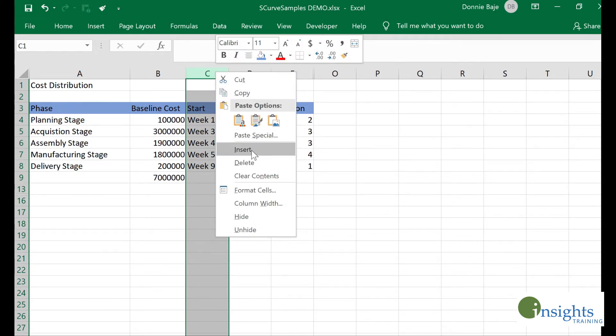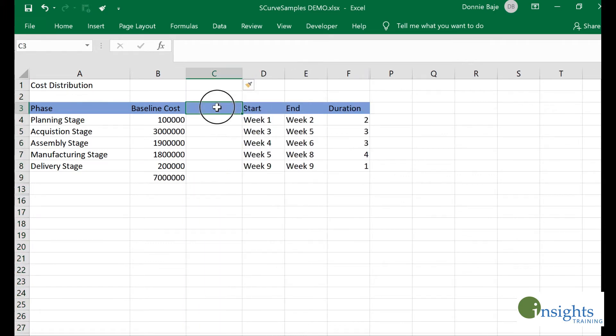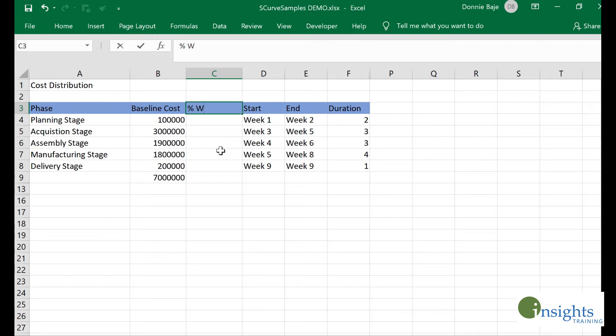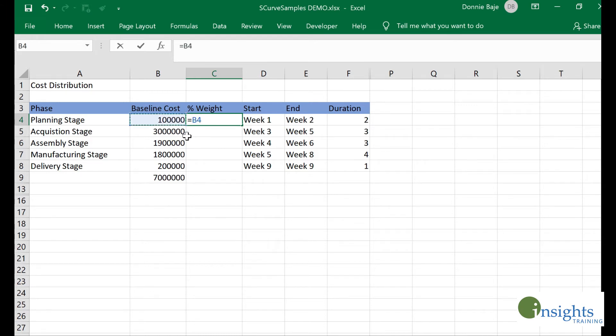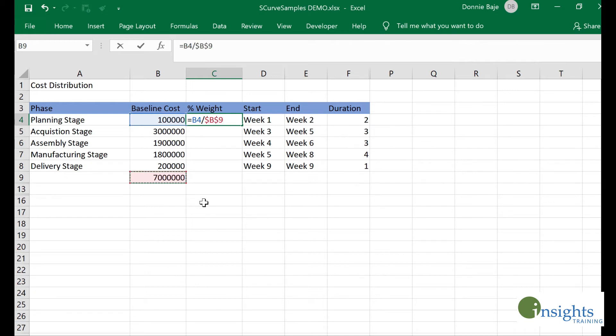Next, I want to check the percentage that each stage will consume from the budget or total cost. I'll call this the percentage weight. I'll calculate it by getting the cost for that stage divided by the total cost of the project.